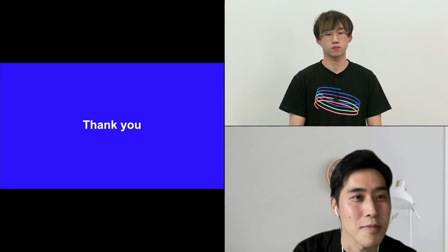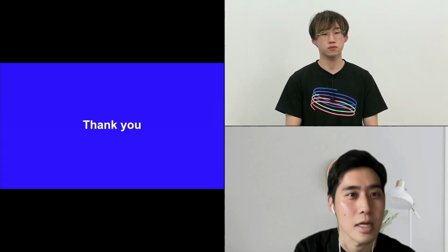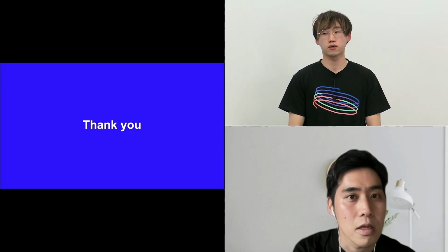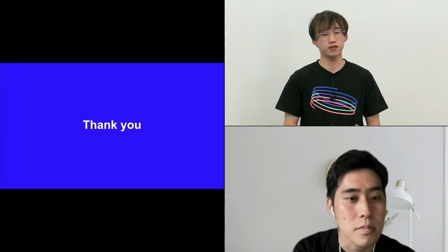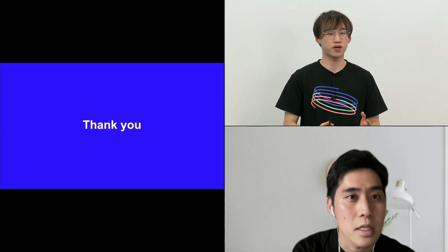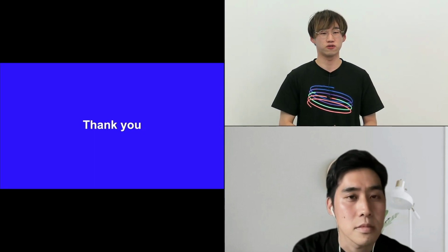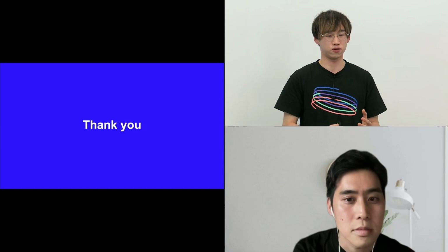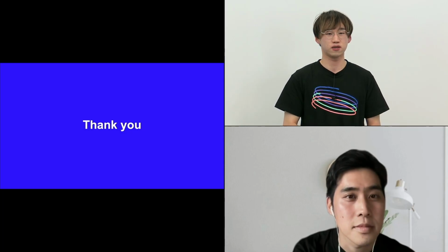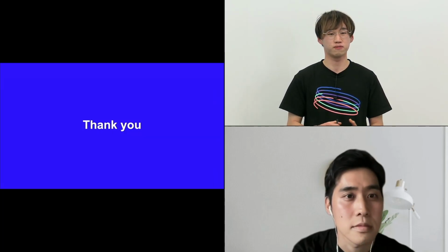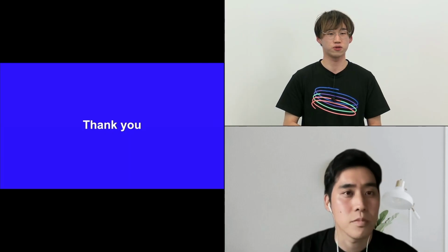Regarding Jetpack Compose, the criteria for selecting modules, which ones to start with when migrating to Jetpack Compose. Did you have any list of criteria? Well, first of all, on an experimental basis, if there are features that are not used or are simple, we selected those and tried to migrate. And if we face any issues, then we share the knowledge with the members.